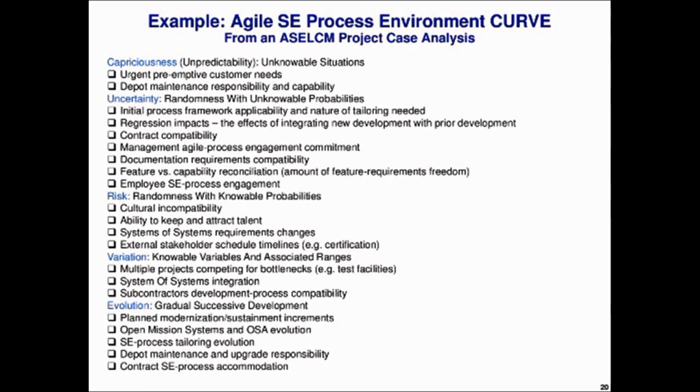or I should say, developed, a very appreciative customer for the approaches they were taking, that over time increasingly put more of the agility requirements of system engineering into the contract work. So the evolution of those relationships basically tended to accommodate the needs of an Agile system engineering process in the contract activity. And we've seen that in more than one place. That's happening, and again, we're talking for the most part about defense contractors here who have onerous contracts in terms of how they have to proceed.